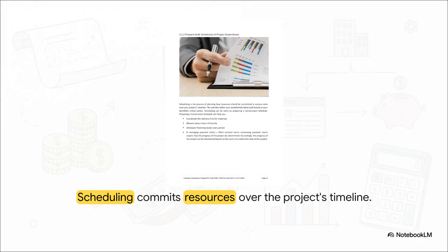Moving right along to Section 2, preparing construction schedules, drafting the blueprint. So, scheduling isn't just throwing some dates on a calendar. It is the real, hands-on process of planning how resources are committed to tasks over your project's timeline. It's about coordinating the exact delivery time for materials, efficiently allocating your labor hours, and anticipating your financing needs for every single period. Plus, managing your payment claims requires that you actually determine the progress of the project, which is very often based on the costs incurred up to that date.